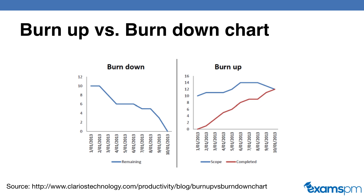Looking at both the burn-up and burn-down charts will give you a good sense of how you're progressing and how much work you have left. They're basically telling the same story, but in reverse — the burn-down chart tells you how much work you still have left, and the burn-up chart tells you how much work you have completed. It's also important to take into consideration any changes in scope, or else you will get an incomplete picture.